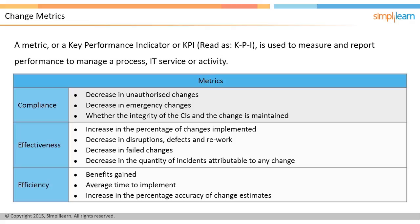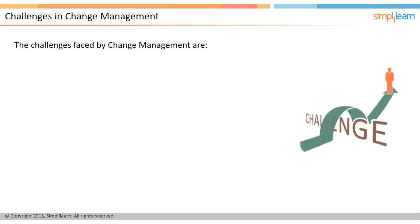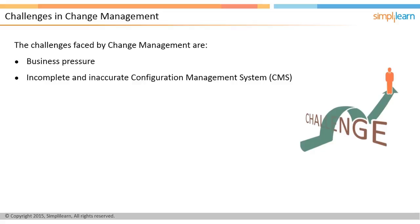The key challenges faced by change management include: business pressure — there is pressure to immediately implement any new business process initiatives in the organization; incomplete and inaccurate configuration management system leading to inaccurate change assessment; technical function areas working in silos; and lack of communication channels between the technical teams and other teams involved in service delivery, making it difficult to execute a change.